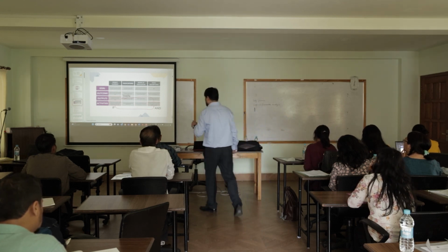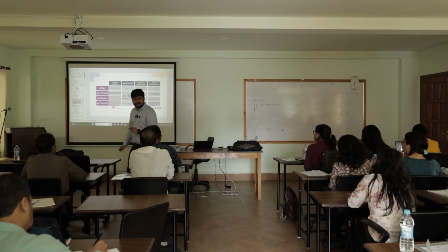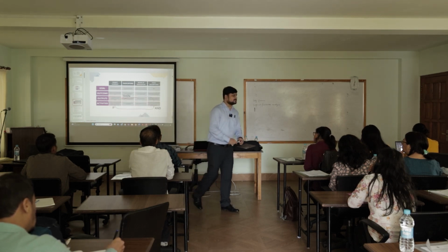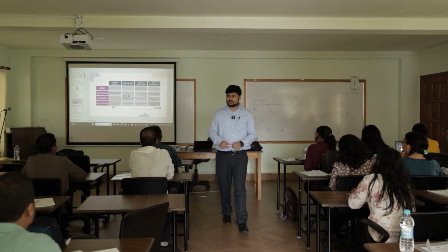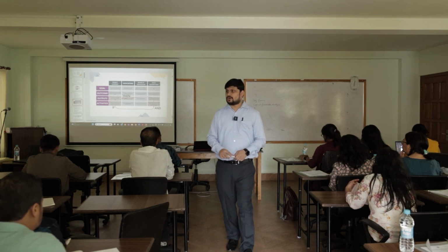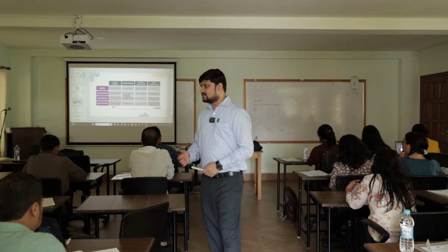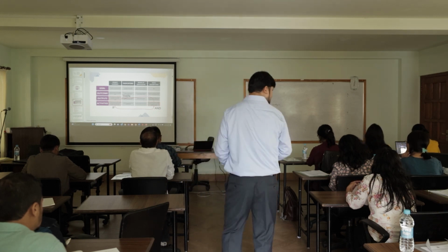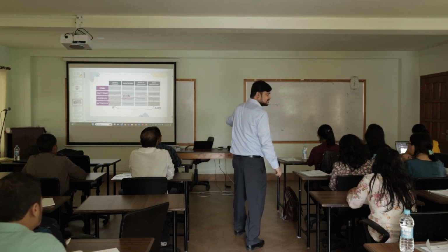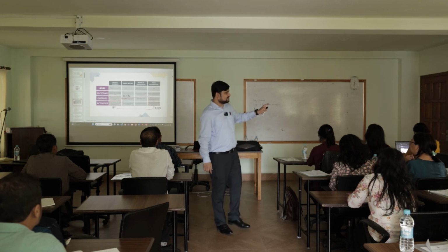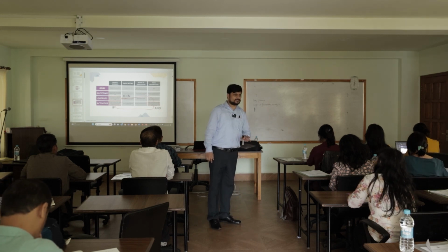Each of those statements corresponds to an indicator also. So the indicators are mentioned, but it does not tell you the means of verification. How are you going to analyze that data, or from where are you going to source that data or information? So that way LFA is different from a theory of change and a results based framework.